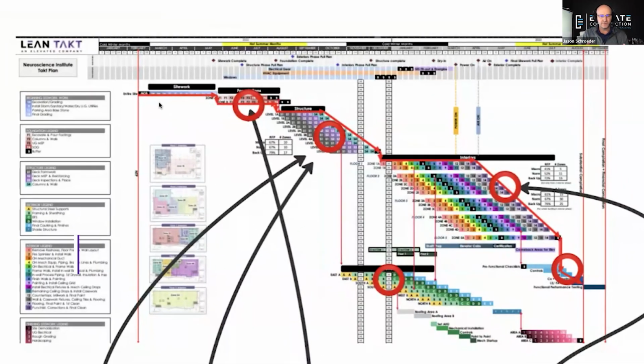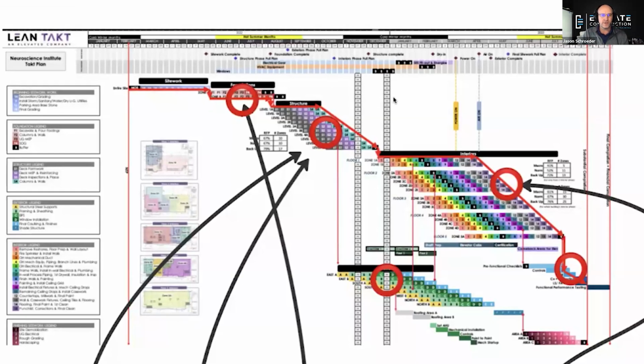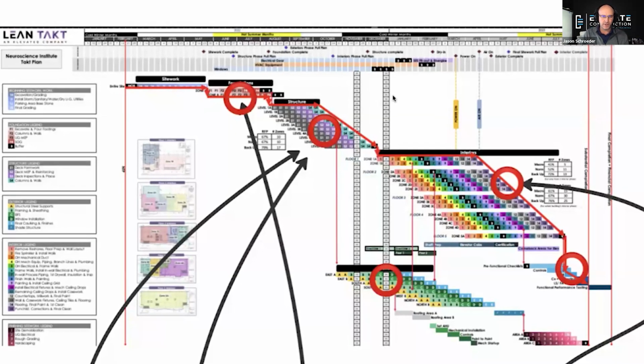Typically, these are packaged on a 5-day takt time, and the actual columns that you will see in whatever application will just be those 1 week increments. This is so that we can narrow the overall production plan and see it on one page. Now, why do we want to see it?